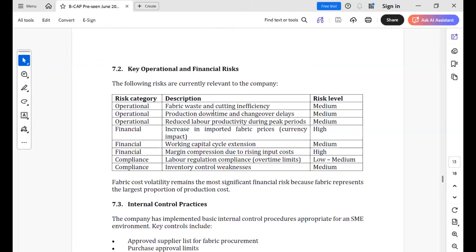Then if level of occurrence is high and also the magnitude of the damage is very high, so those are in red colors. You can categorize as red, top attention, right? And also if the level of occurrence is medium, and the magnitude also medium, you can put it as medium. If both axes are low, you can categorize as low. For these things, you don't want to spend millions of rupees, right? These things internally you can do that, right? Even a small company, you can do that, right?